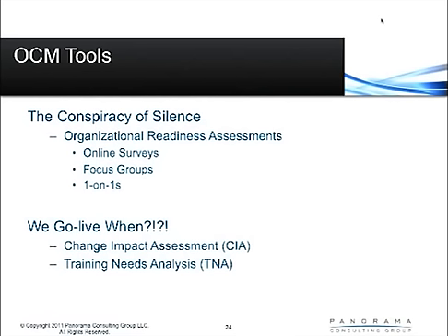When you look at the "we go live when" situation, change impact assessment is one thing that's very important. In fact, that's important no matter what. Forget these five issues. Change impact assessment is crucial, and so many companies fail to understand how important that is. That's where you're looking at your future state process, which most companies are keen on focusing on, but you need to understand the gap between that way of doing things and the way that employees are used to doing things. You want to build your communications messages and your change management strategy around addressing those gaps and making sure you're closing them. So that change impact assessment is important, as is the training needs analysis.